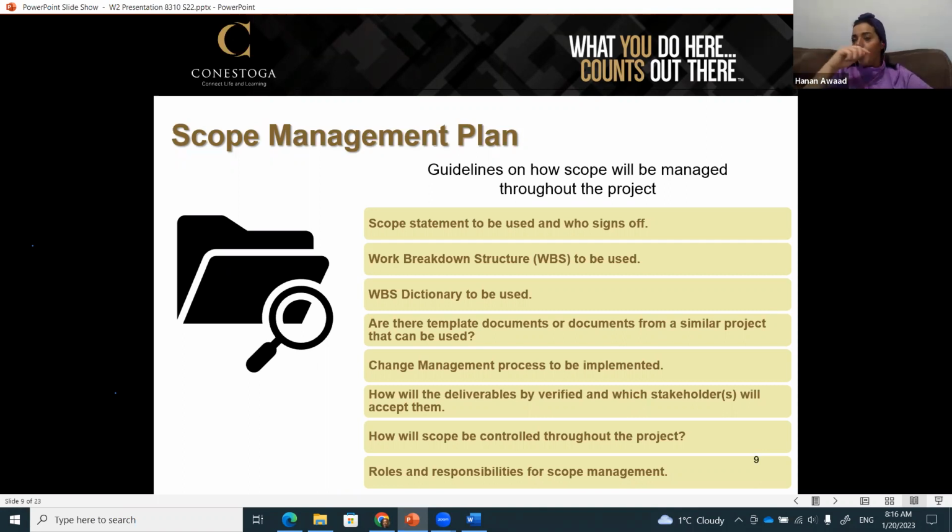One important reason for scope creep is undefined or poorly defined scope. When we don't define the requirements very well, when we don't state clearly what is included and what is not included, especially if we are working with external customers.